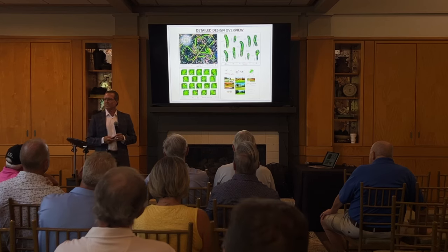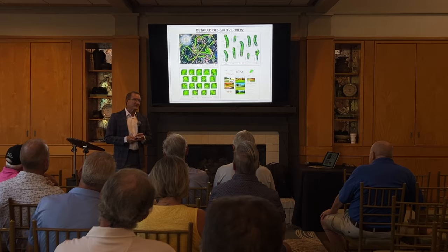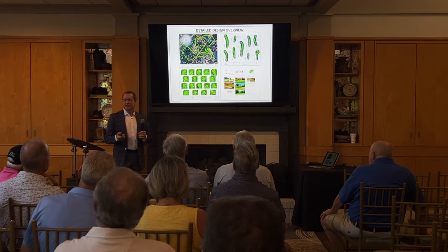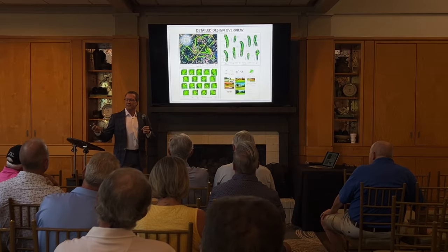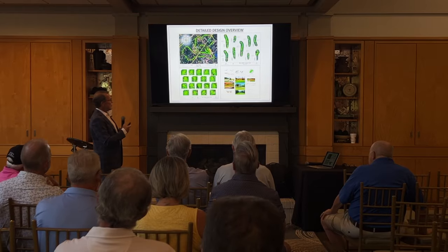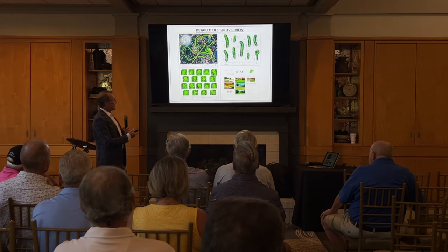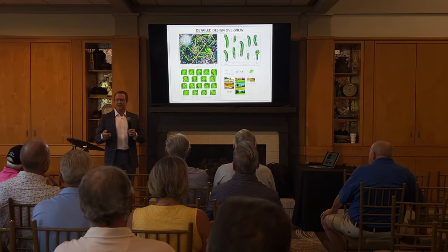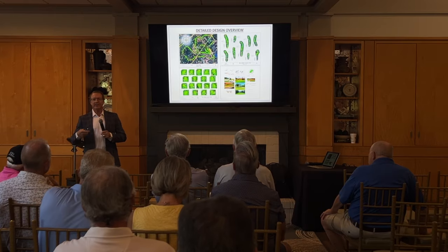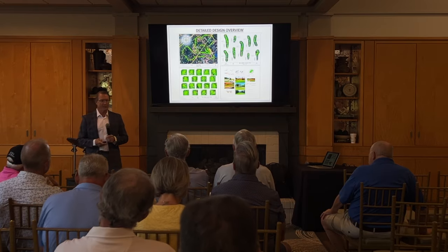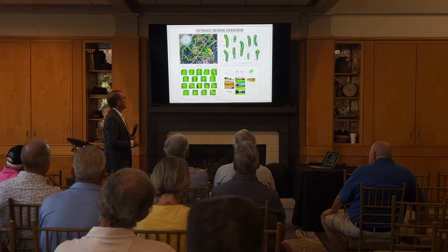So the pricing is real pricing as it is today. Now, if we do something a year or 2 or 3 years down the road, obviously we'll have to reprice it. But the exercise of all this detailed design is very specific, defined scopes of work that relate to quantities, and then that quantity, there's a price associated with that.